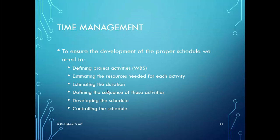To ensure the development of a proper schedule, we need to define project activities as done in the previous session, estimate the resources needed to accomplish each activity within the given time and budget with quality, estimate the duration of each task based on different methodologies and techniques, and define the sequence of activities through the network diagram and Gantt chart. Given all this information, the schedule will be developed and the project manager will use techniques and tools to monitor and control the schedule as the project is executed.